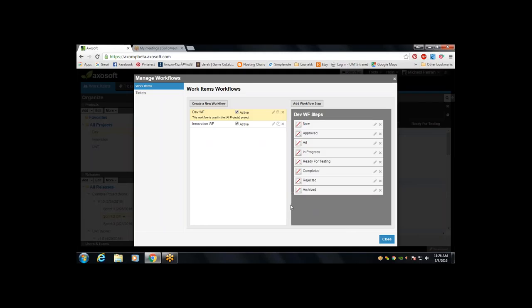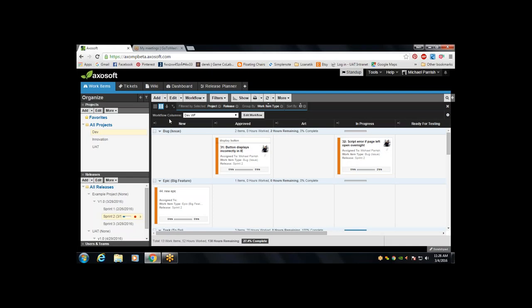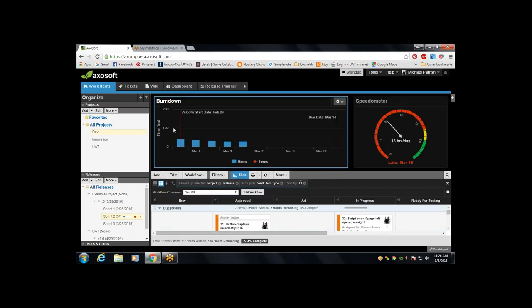So what happens there is we've seen where you get this kind of plateau and then cliff, which isn't really realistic of what you did. It doesn't represent what the true effort was. You may have chipped away at it. So this is where committing time consistently throughout, not necessarily at the moment, but at the end of each day, try to go back and plug in your time as you did it that day,